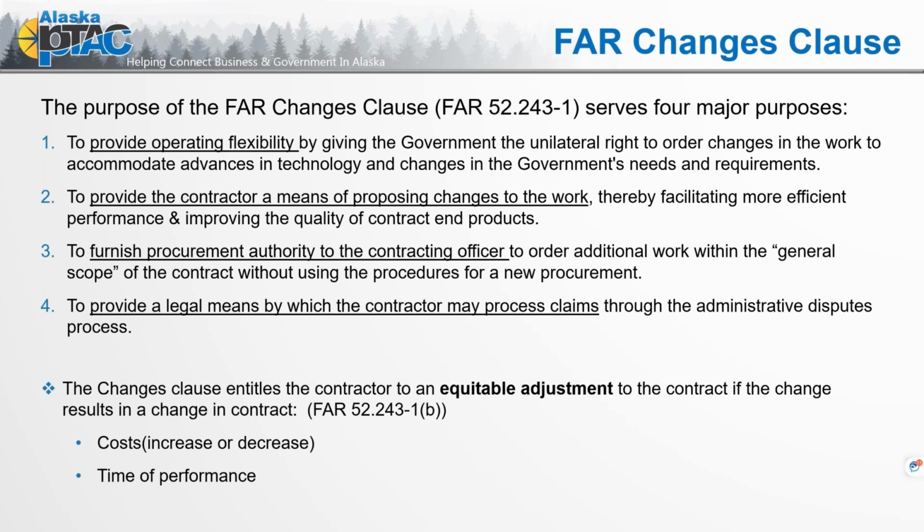And again, this is a nice time to stop and look at the clause again after our discussion of what to do when we have contract change. The changes clause entitles the contractor to an equitable adjustment to the contract if the change results in a change in contract, and it impacts either cost, whether it increases or decreases, or time of performance.